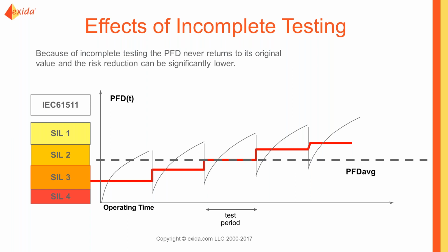So that's an important thing to keep in mind. And that would come in with our FSA 4 or the FSA 4 reviews. If you're making a change to the system, you validate it again, and even if it's a very stable system, you still want to periodically check: are you doing proof tests? Check your actual failures.